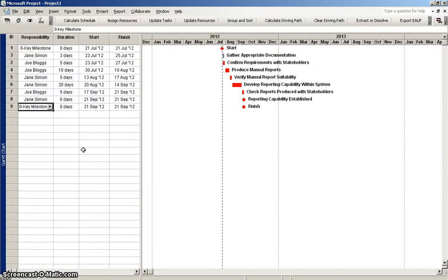And of course, as we say, there's a million ways to slice and dice a project. So you may want to have a view that's grouped by and categorized by deliverable. You might also want to have one that's grouped by who's responsible for that. You might also want to have a view that shows just completed activities within the past update cycle. So in order to do that, the easiest way is to set up a new view for each one of those, and then you can go back to each one of those and then print a report based off of that view.